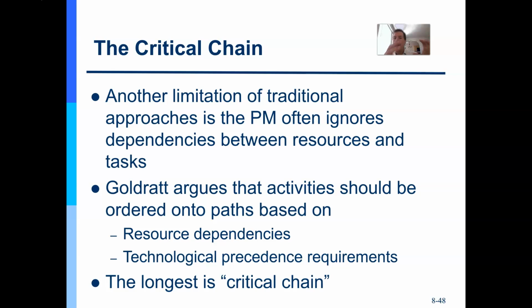This is simplifying it, but it's good enough, and moves them to the end of the project after the end date, and you, the project manager, manage that buffer use rate. And the other piece to critical chain is that you then may have to, because you've really tightened down the activities, consider resource utilization again if you're using Goldratt's approach, right?